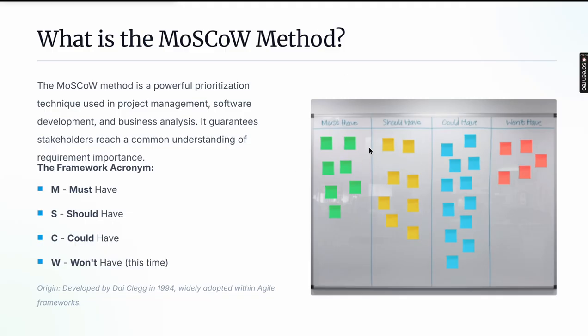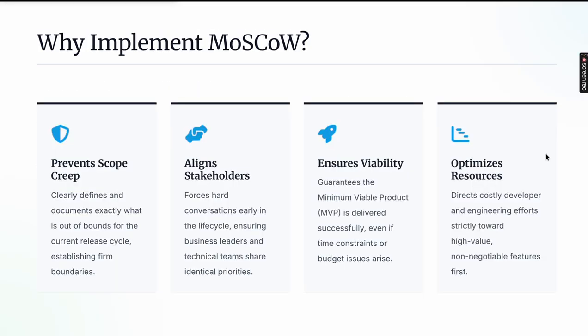As you can see, these are the must have, should have, could have, and won't have columns. If you are building a product or a minimum viable product from scratch, you can have things in prioritization. These are the must haves that have to be there to go live for your platform. Then should have and could have are beneficial but not more urgent, and won't have is non-beneficial, not urgent.